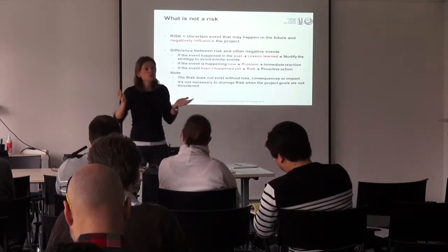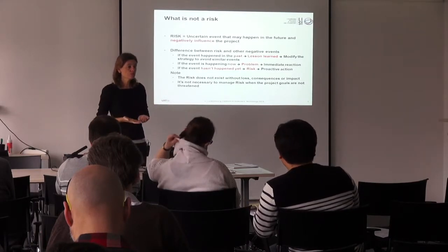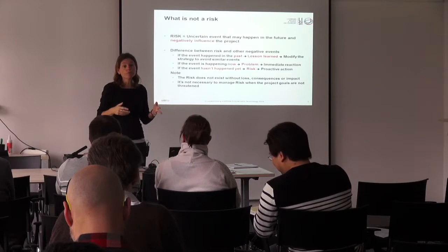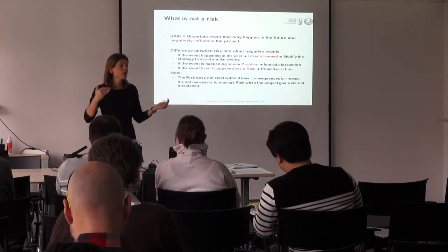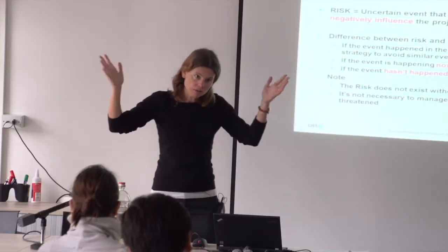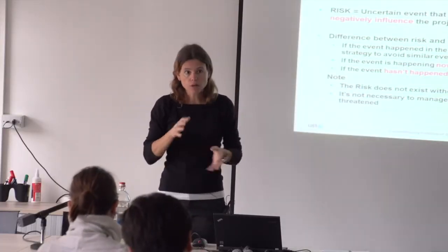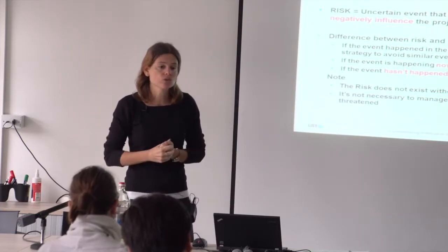You could go that far because at first in risk management you're asked to identify all the potential events that could have an impact on your project. But then you try to drill down to focus more on the risks that are really important to treat on your project.